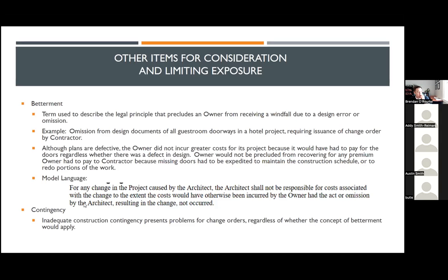And the last area that I see as really driving a lot of claims is contingencies on the project, and not having a sufficient contingency or no contingency at all. Again, going back to the standard of care and understanding that there's no such thing as a perfect set of plans. There are going to be issues that arise during a project, whether due to an error or omission, that are going to add to the cost of the project.